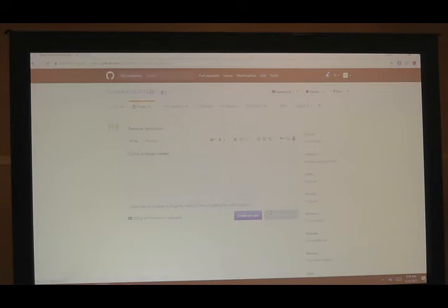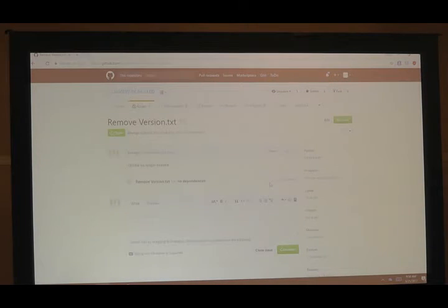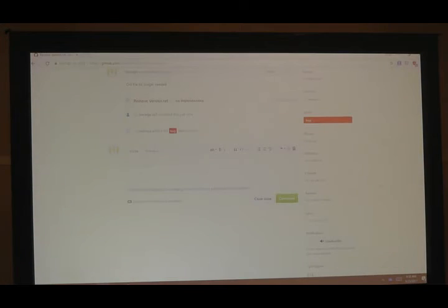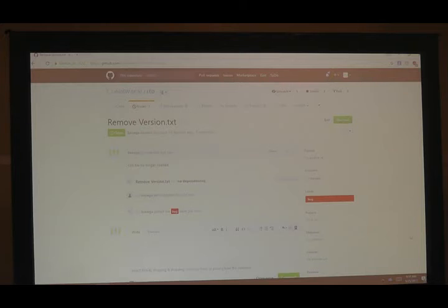So basically, I created a new issue. The things I have to do here is assign it to someone, so I can assign it to myself. Also, you can add labels to say if it's a bug, an enhancement, or what we're doing. In this case, let's call it a bug. We can also designate if it's in the project when we're managing it. So once the issue is created, then I can actually work on it.